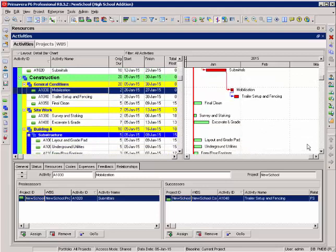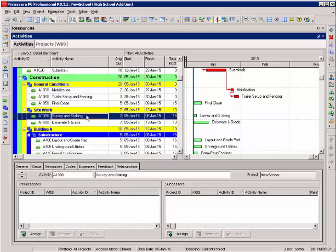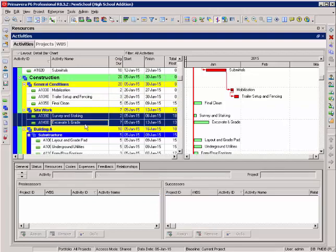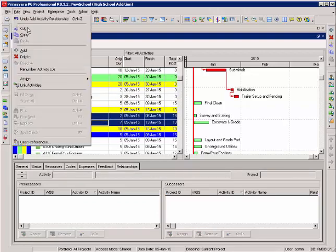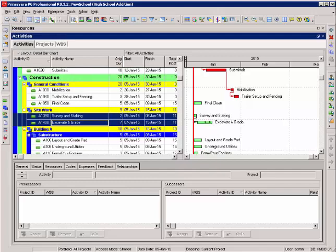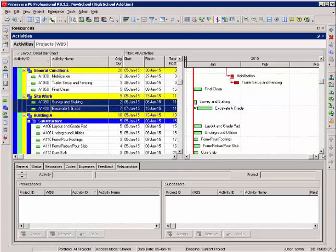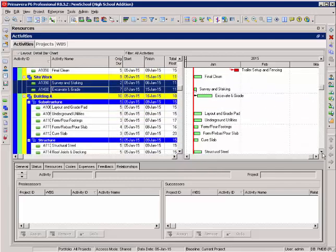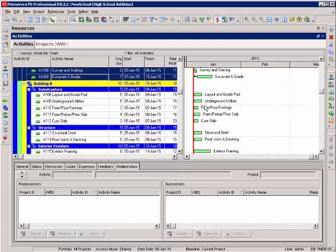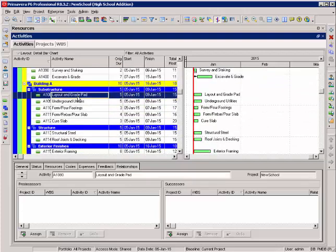Let's look at the second way to link activities. I can select more than one activity. I hold my control key, select another activity, edit, link activities. Notice it added a finish to start relationship with those activities.